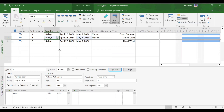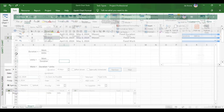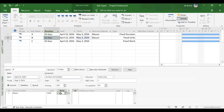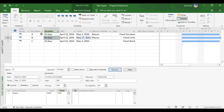Last case for fixed units: increasing work to 160 hours. Units remain the same, so duration will vary. Work is 160 hours and units is 1, so duration will become 160 hours — that is 20 days. Making work 160 and clicking OK confirms duration has become 20 days. This covers all cases for fixed units type task.